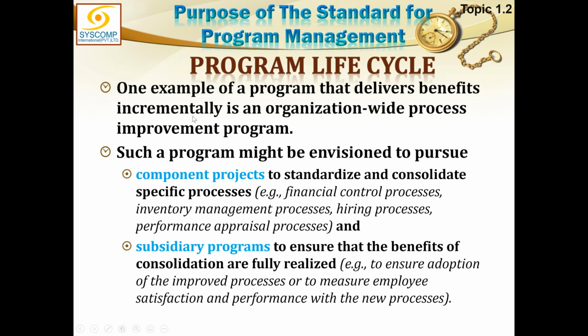Okay, then the example of this program life cycle. One example of a program that delivers benefits incrementally, as I was just saying, is an organization-wide process improvement program. Whatever processes are being improved, they are being delivered to the organization, so continuously throughout the life of the program, you keep delivering value. Such a program might be envisioned to pursue component projects to standardize and consolidate specific processes, and subsidiary programs to ensure that the benefits of consolidation are fully realized.